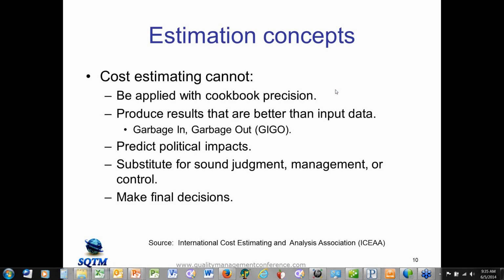A power function curve in log space becomes a line, so now you can find the slope of the line. Then you convert that back from log space to normal space, and that gives you the value for the power function. That's, in a nutshell, how you do it.